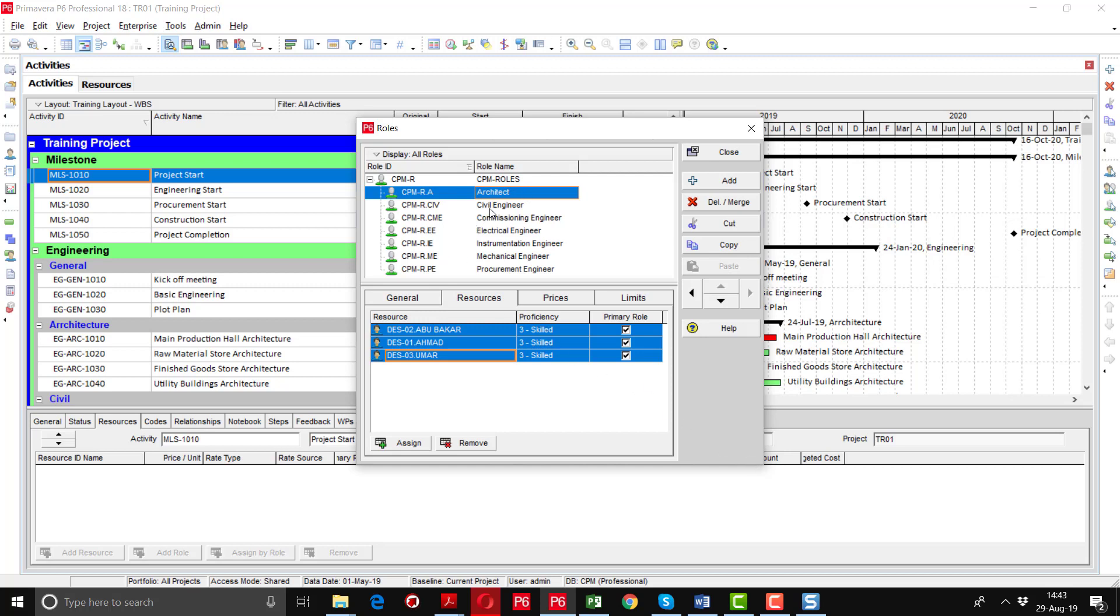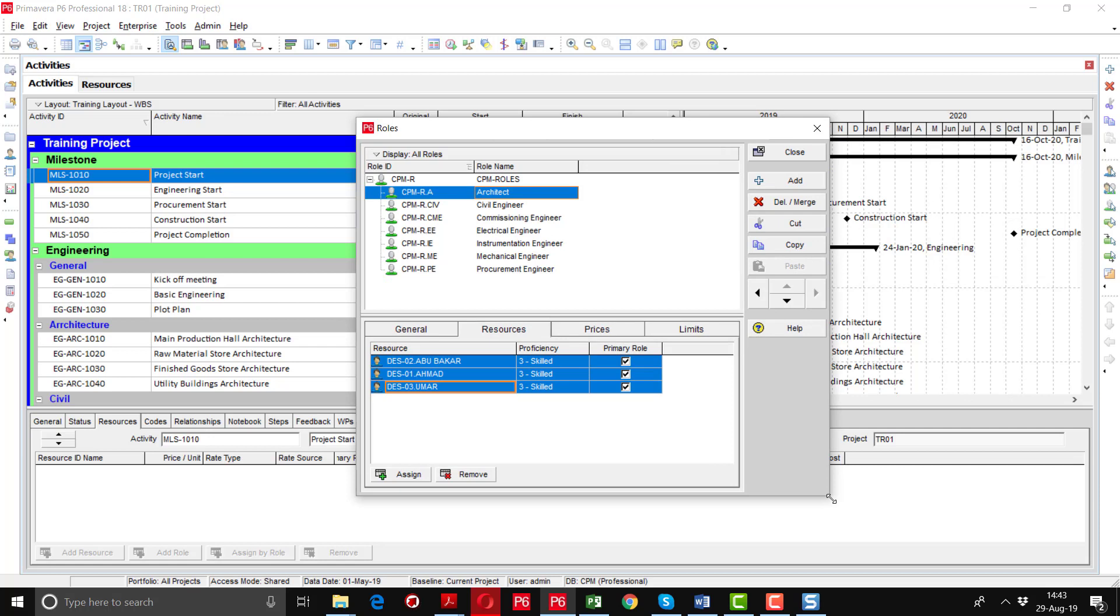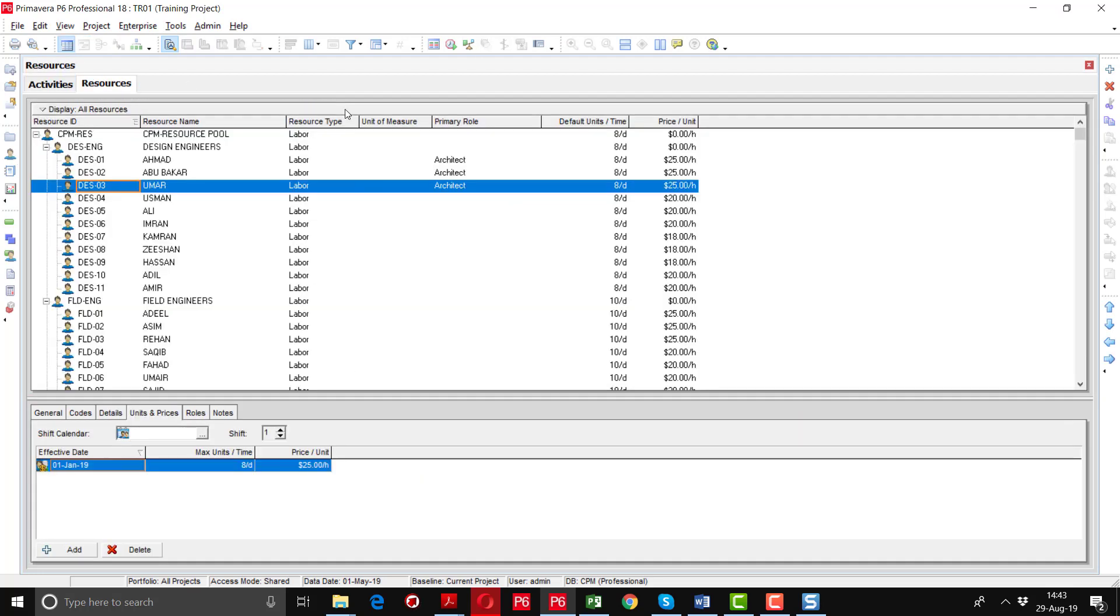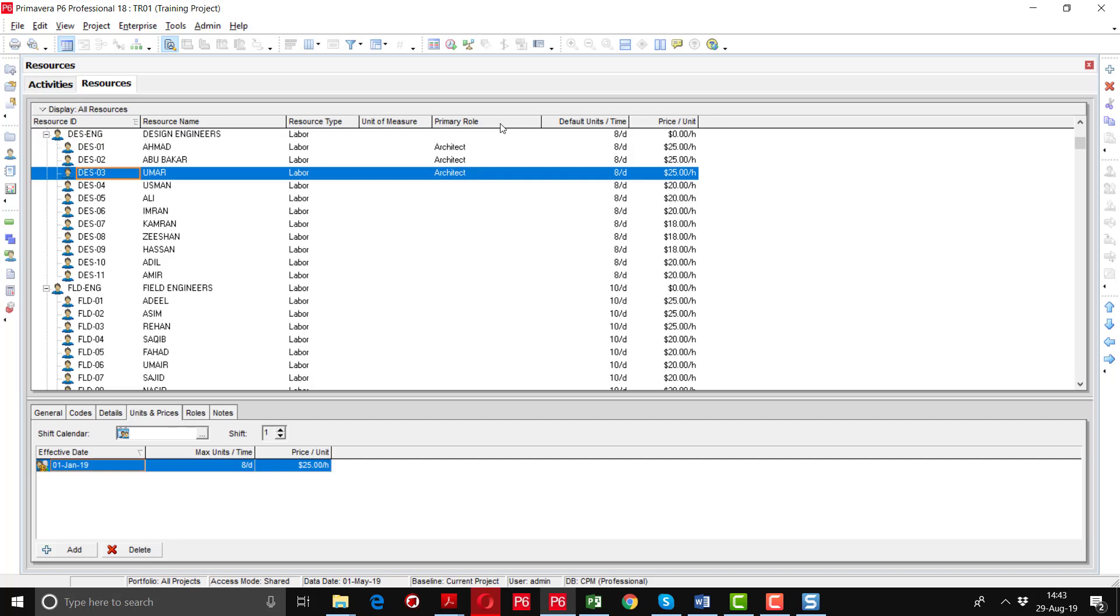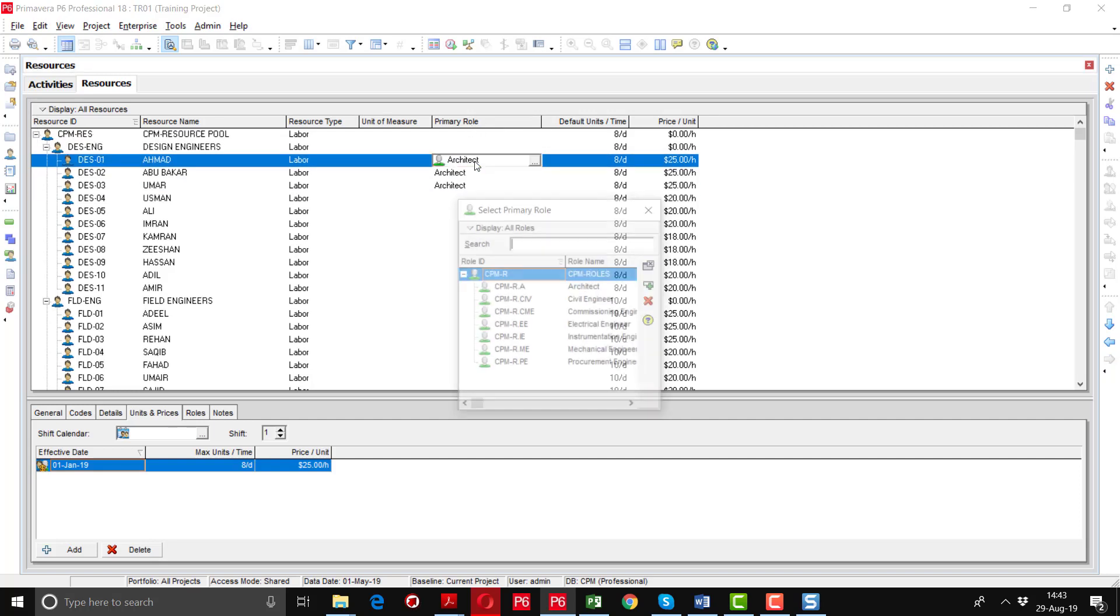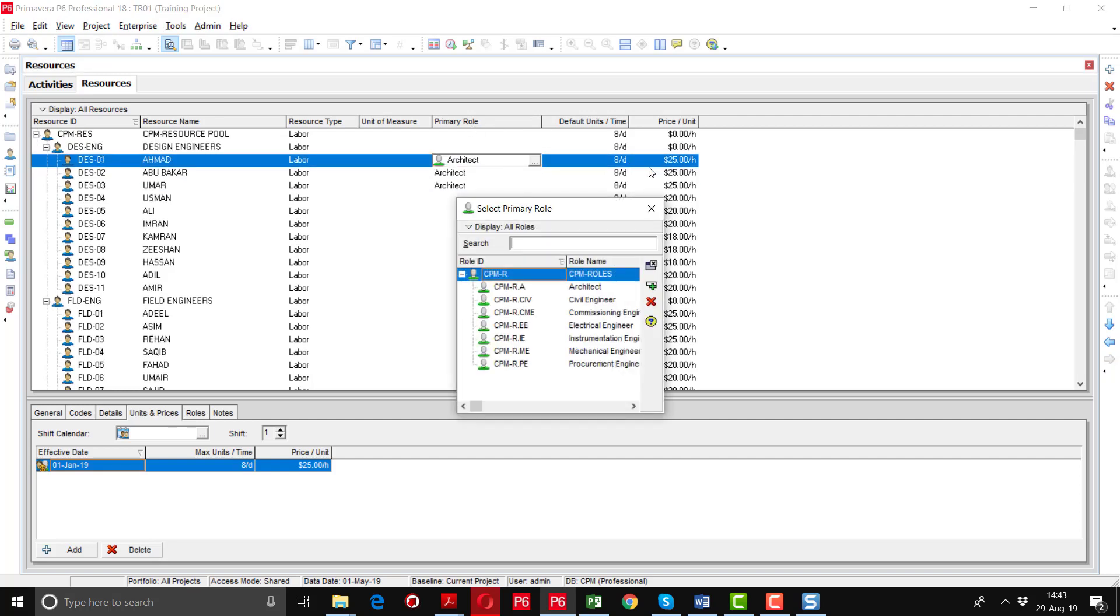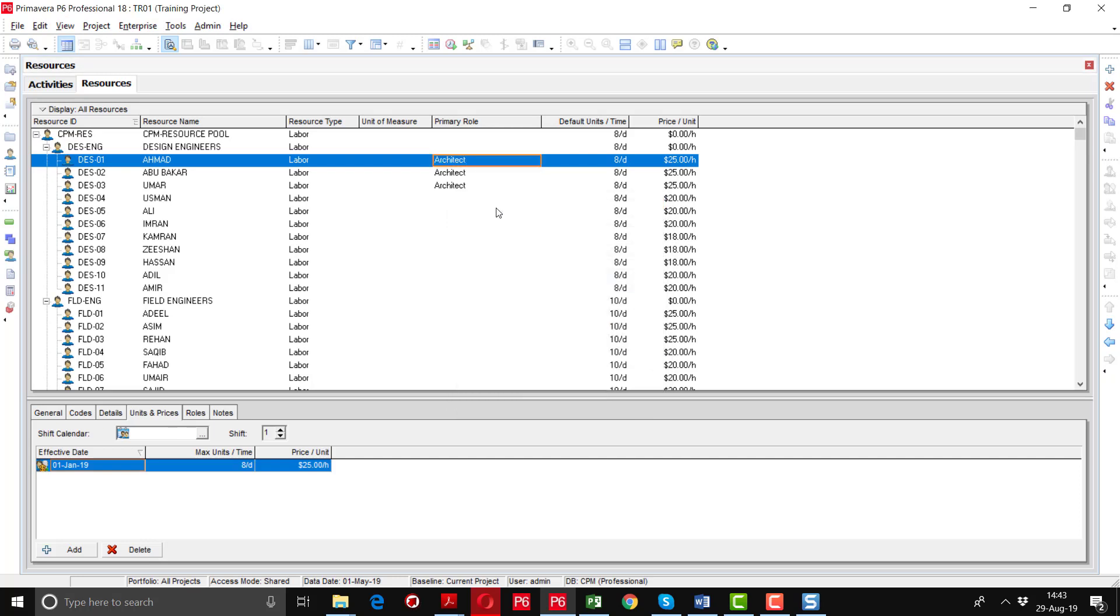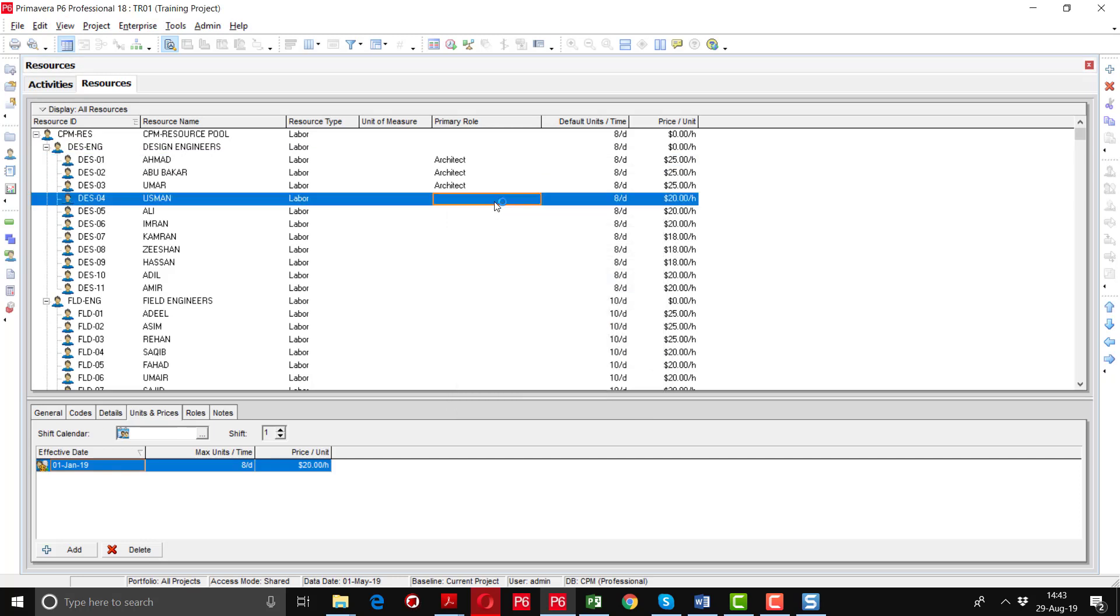In this way for different roles we will assign the different resources. And if you want to assign the resources as well, you can also add your roles in the resource tab. Then go to the resource option and here you can see that I have defined the primary roles here so it is automatically linked with these resources. So if you want to add the role here you can also add in the option of resources.